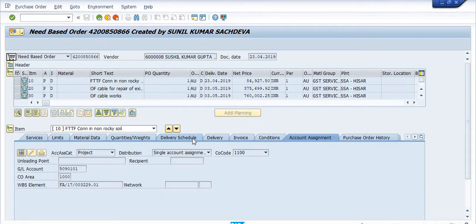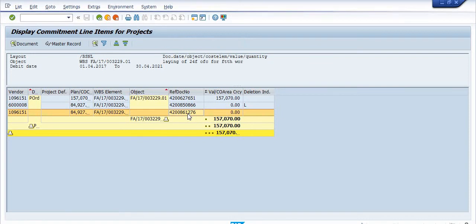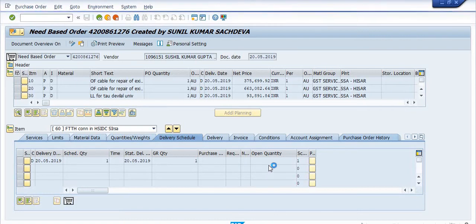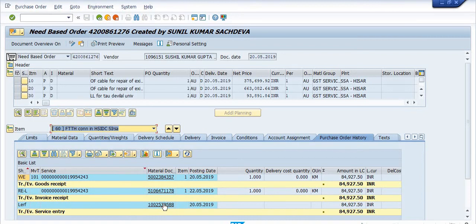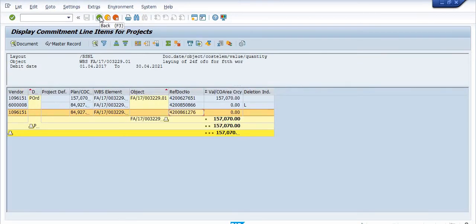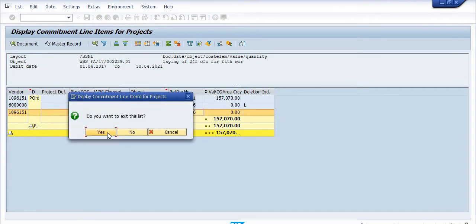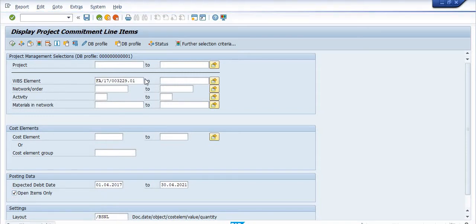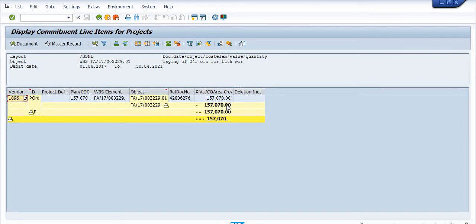For the other purchase orders, clicking on the delivery schedule shows no open quantity because those POs have been blocked, deleted, or short-closed. In the third purchase order, there is no open quantity because 100% billing has been done — that is why nothing is showing in open quantity. You can also check the 'open items only' filter in CJI5 so you will get only the open quantity items, making it easier to identify open purchase orders with respect to the WBS element.